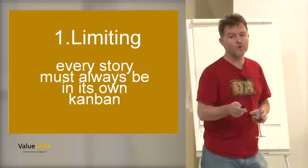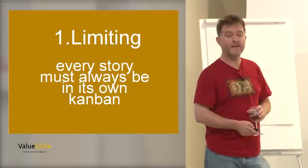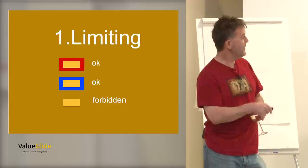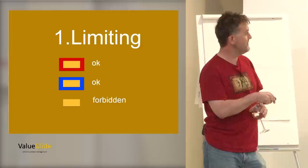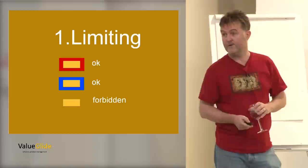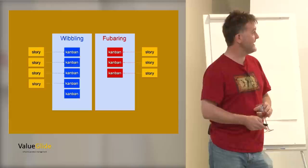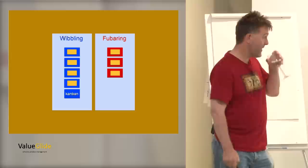Now we have to introduce a rule. We only actually need two rules. The first rule is limiting. Every story must always be in its own Kanban. Otherwise it doesn't work. So if we visualize that, we can see that this story is in a red Kanban from the red team. This story is in a blue Kanban from the blue team. But this one isn't in a Kanban. So that story is forbidden. You're not allowed to have that on the diagram. And so what we simply do is put the stories back into the Kanbans like that. And that's it. Everything follows from that.